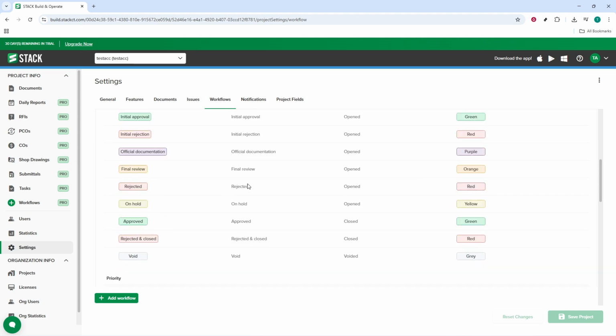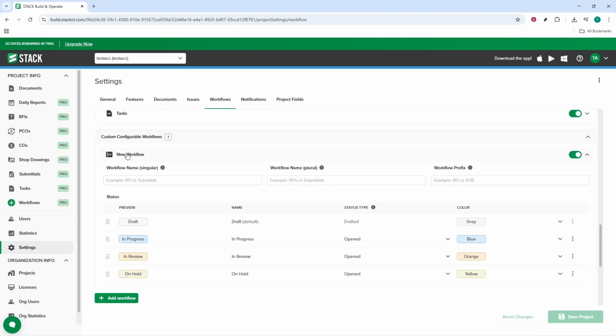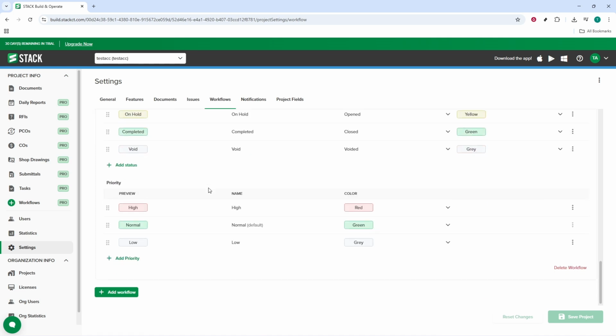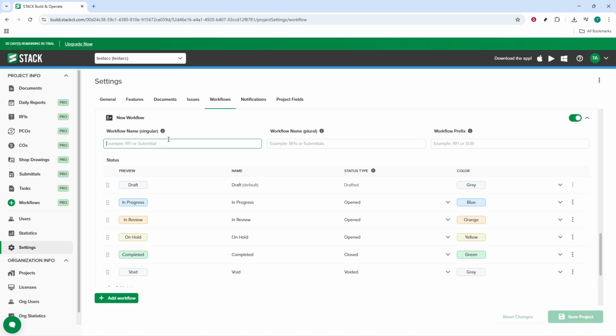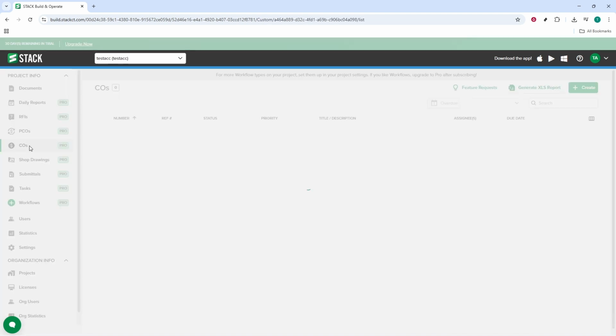Track cost impacts through issues and changes. Most unexpected costs show up as rework, scope changes, delays, or material shortages. Log those items, attach photos and notes, and include an estimated cost impact. This creates a clear paper trail for overruns, which helps with approvals and future lessons learned.